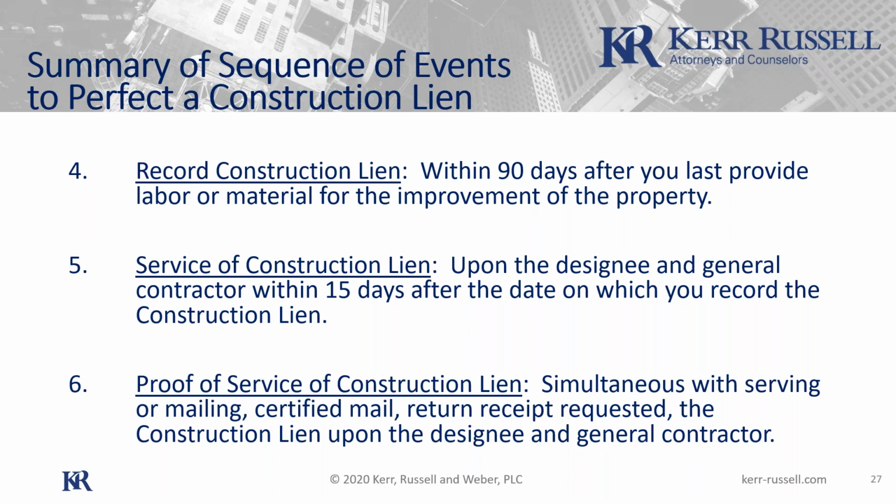Because the way that the courts have interpreted what is warranty work seems to go both ways. Sometimes they act like something that sounds like warranty work is not, and other times they'll characterize something that's more like punch list work as warranty work and act like you were too late. So, the sooner the better, obviously, for filing your lien. When in doubt, I'd use an earlier date if you still have time within the 90 days.